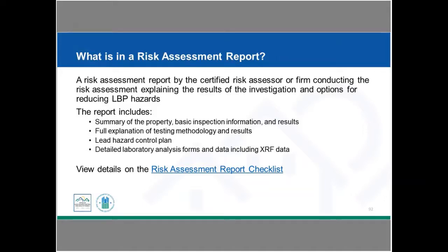This does not necessarily give you the specifications to be able to put into your scope of work. So, we've determined that we're going to do a rehabilitation for this person's home. We're bringing it up to the property standards that are required under CDBG or HOME. But as part of this, because we are triggering a risk assessment, we're also identifying potential hazards throughout that property. So our scope of work will then be updated to also include any of our interim controls, or in the case of abatement, the actions that are going to be done as part of that.